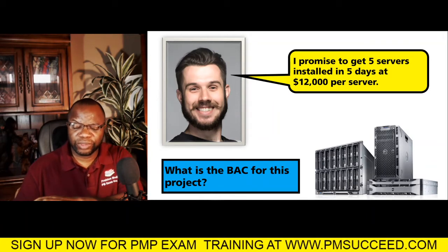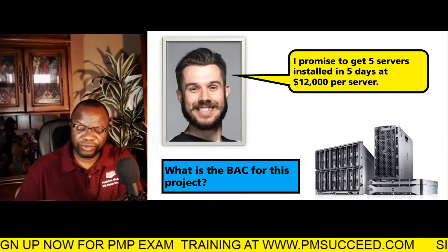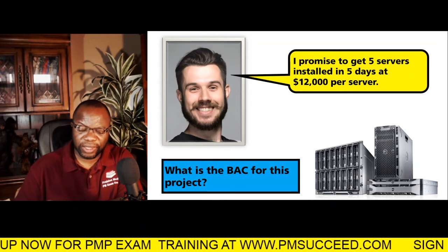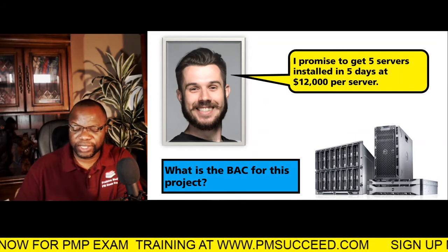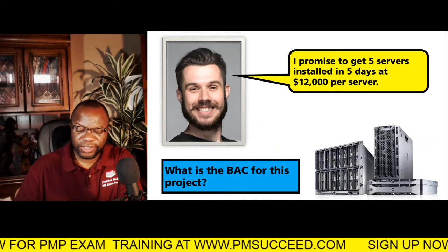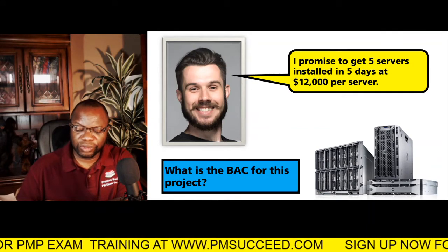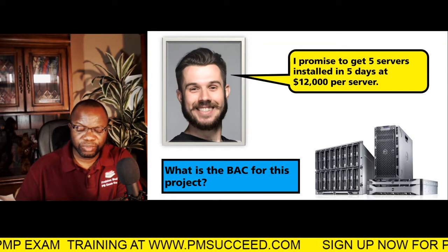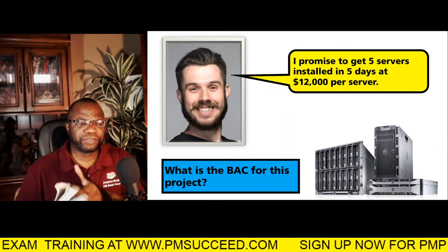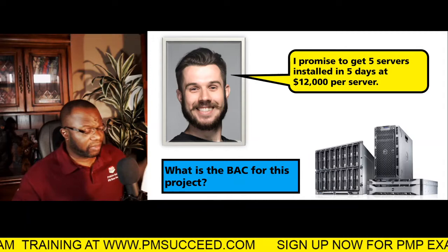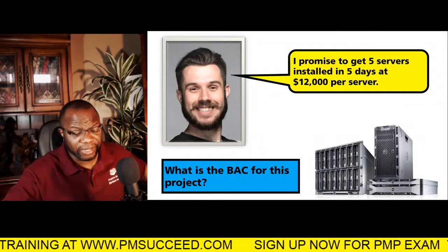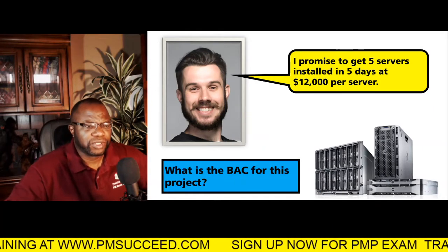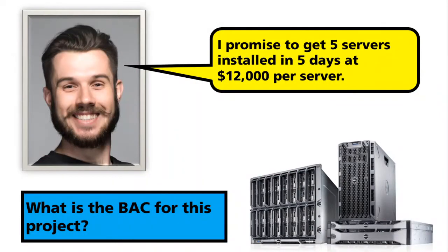If you add up all of the planned values, as you can see in that column on page 267, it says against the BAC, the value of total planned work, the project cost baseline. They should have just said the sum of all PVs, the sum of all planned values. That's the pragmatic way of reasoning it. So the bottom line is your budget at completion, my friends, is the sum of all of your planned values.